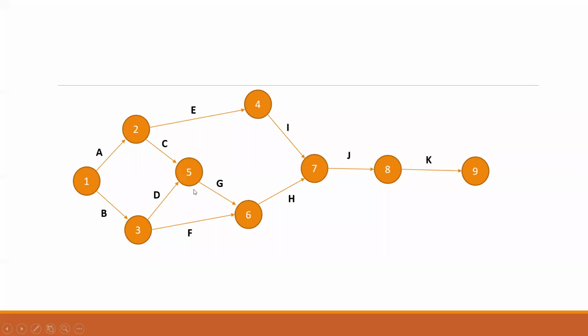So I'm hiding this one. So 4, 5, and this is already hidden. So we can give this number as 6. And this is given 7 because if I hide this one, there's still an arrow which is coming from here. And that's the reason we have given 6 here. And then 7. And this is very simple. It's in a straight line, so you keep on giving the next numbers here. So there was a complication here where we gave 4 here and 5 came here. That was just because there was one arrow which was still coming to this particular node, whereas this node did not have any arrow coming in. And that's why this node got the number 4 first.